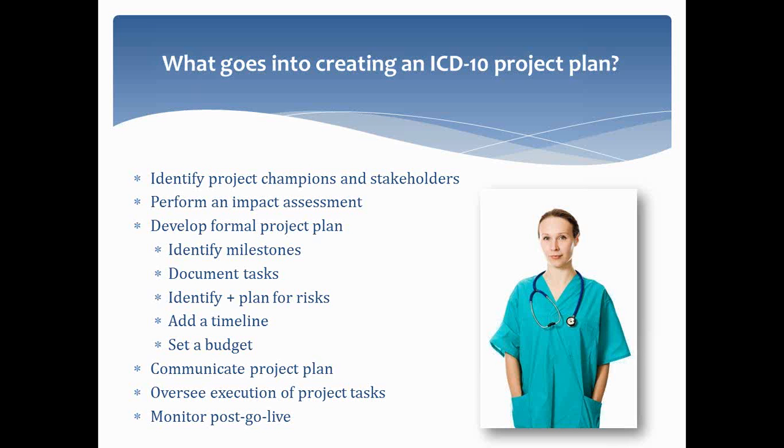And then set a budget. So do you need to have additional funding either before your transition, or do you need to have money available after go live? So you need to have a cash reserve maybe available to overcome slow payment or denied reimbursements or things like that that might impact your cash flow.